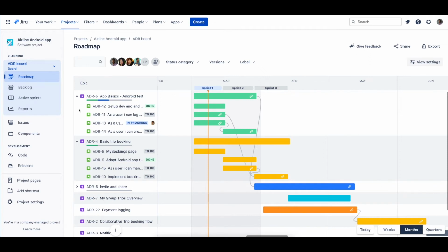The progress bar below the epic provides a general overview of the epic's progress based on the status of its child issues within the project. The bar shows how many story level issues are in to do, in progress, and done. If things are running behind schedule, this allows you to see the team's progress at a glance for this piece of work so the team can take action.